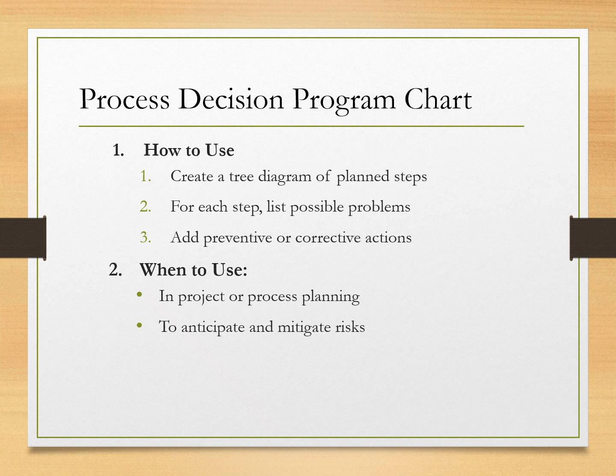This tool is vital for major projects where failing is not an option. For example, when launching a new inventory system, we might plan actions for missing training, confusion, or staff turnover. By preparing for those risks early, we boost our project success and show true professional foresight.